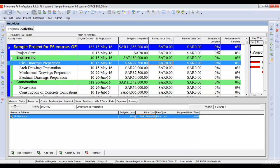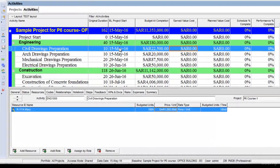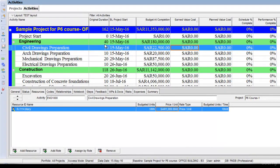Looking at this activity, civil drawings preparation — its baseline start is 15th of May 2016, it has an original duration of 10 days, and it has a resource assigned to it, Mary, who works 180 hours on this project. Those 180 hours cost $22,500. So the budgeted completion of this activity is $22,500.